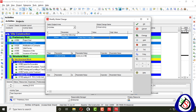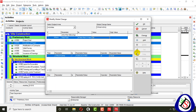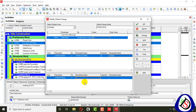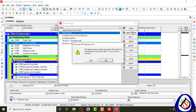We can write everything we want in the text field here. We can write any parameter value. And for the else condition — if the activity does not fall into the critical parameter — we go to 'Critical Activity' and write 'Non-Critical Activity' shown in green. Then we can apply changes and confirm yes.